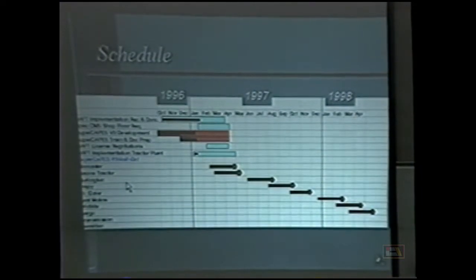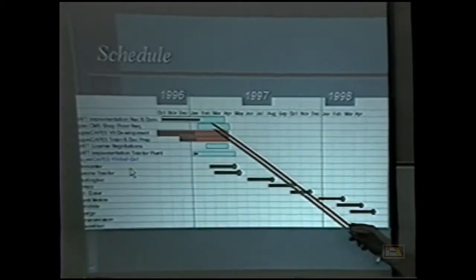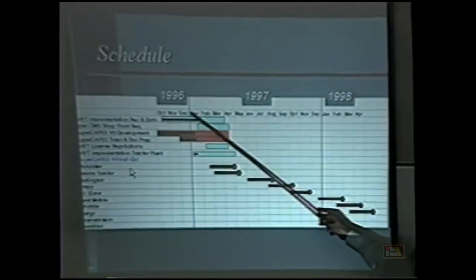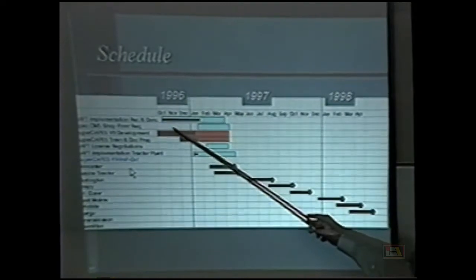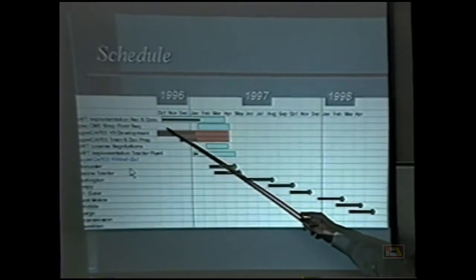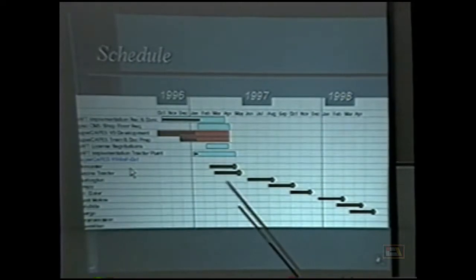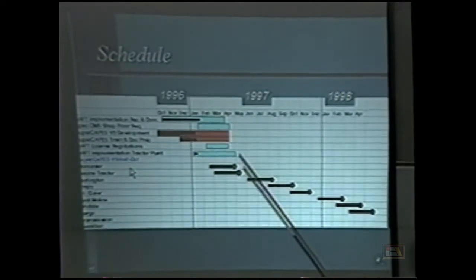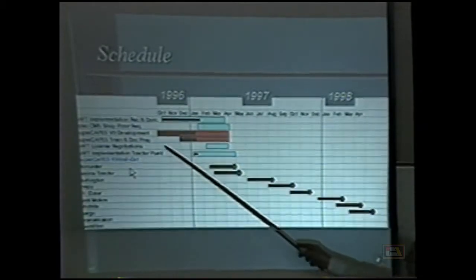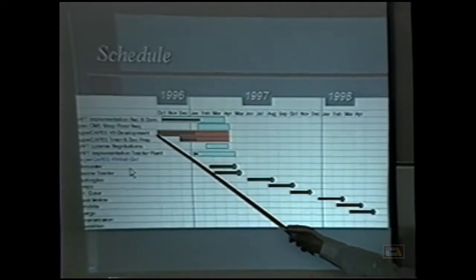We've also started the Raft implementation here at Tractor. And looking at a total rollout, Doncaster and Racine should be up and running with everything they're going to get out of this phase by the 1st of May. The next place we'd like to go is Burlington, starting in midsummer, followed by Creppy, and the tie there, of course, is the loader backhoe.